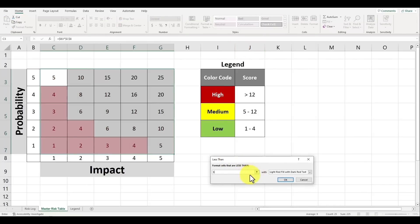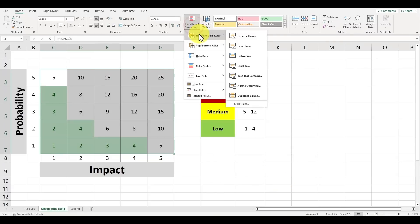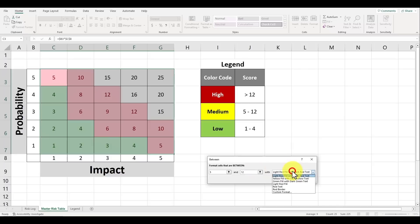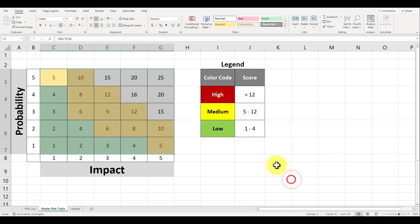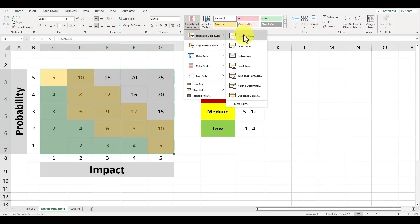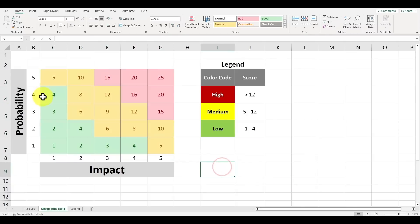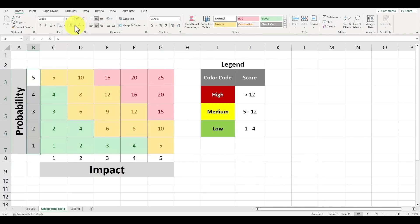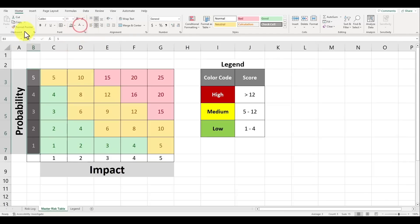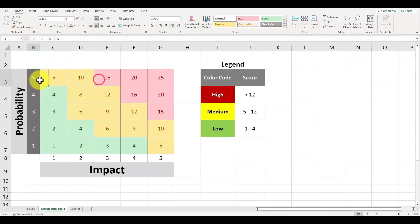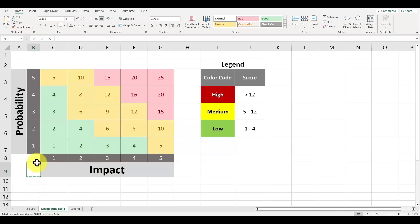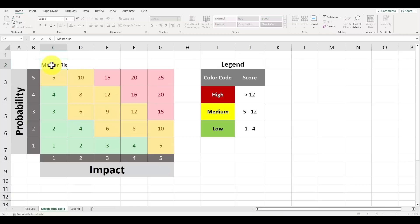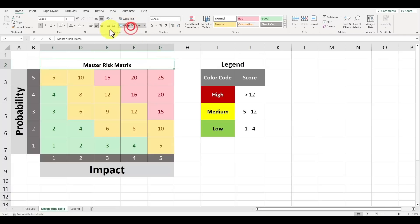Select OK and let's do this conditional formatting for cells which have a value between 5 and 12. Let's fill in these cells with a yellow fill with dark yellow text and select OK. Let's select the entire matrix and format the cells that are greater than 12 to be a light red filled with a dark red text. And so this master risk matrix table is a great visual indicator to show you where risk will fall based upon their score value. Any risk which has a score greater than 12 is an immediately high risk and is colored red, and this is where you should focus your team's efforts on mitigating these high impact and high severity risks.